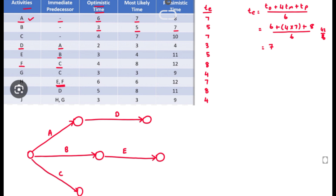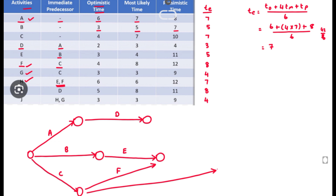For activity F, C is the predecessor activity. For activity H, both E and F are the predecessor activities, so we join E and F together. C is the predecessor of F, and E and F are the predecessors of H. We also draw activity G, for which C is the predecessor activity.